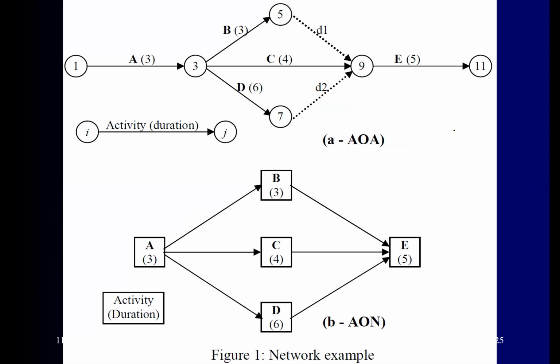And as I already mentioned, in order to draw this diagram completely without dummy 1 and dummy 2, there is no way you can draw it to show people, because the drawing inside the arrow diagram must be interconnected. It cannot be just hanging around like that.